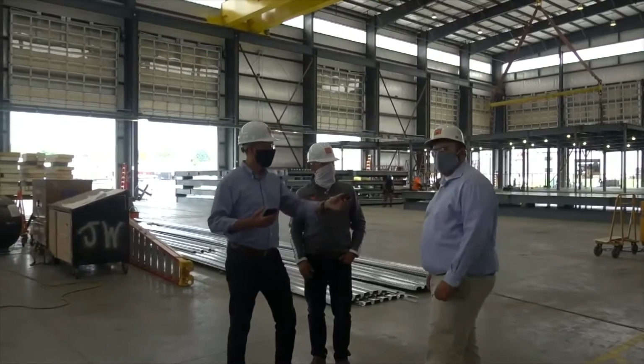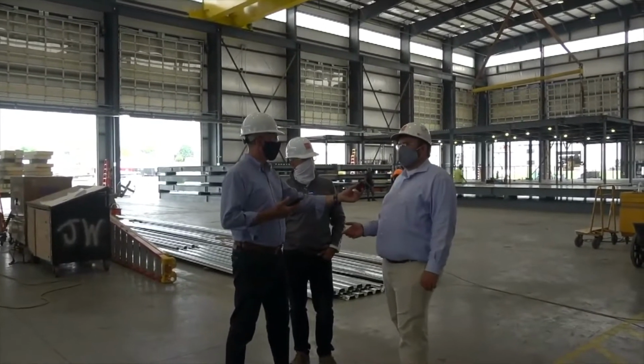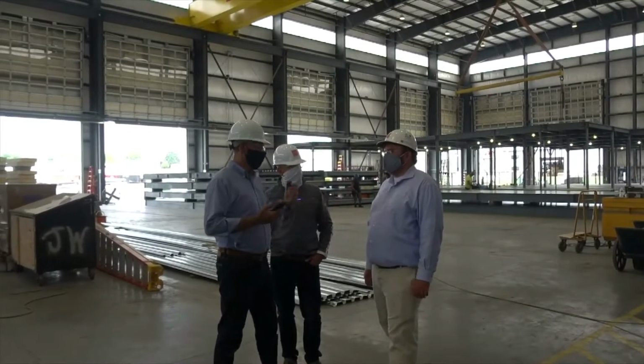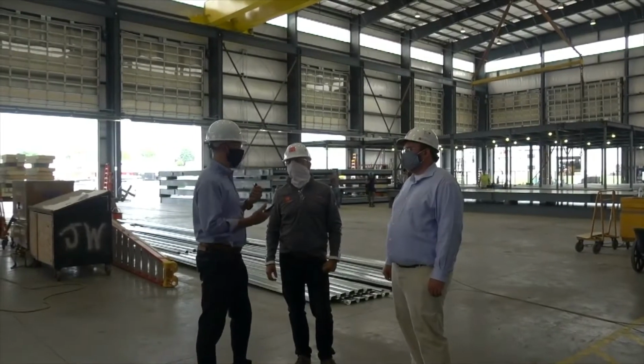Casey probably knows a lot of the schedule. So we started fabricating in the beginning of July, and the last module will ship at the end of March approximately, or set at the end of March. It'll be set at the end of March, right? So you're going to start delivering these in January is what I heard. And you're still going to be done before the site work's done.